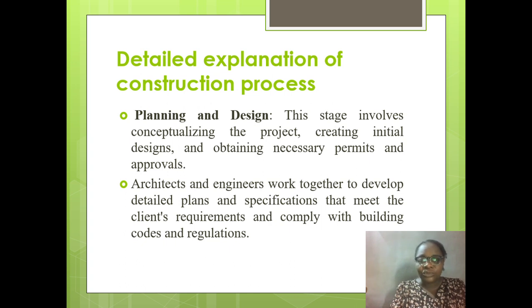So from that, he calls on building professionals that create initial designs, including architects and engineers. There we also have the quantity surveyor to bring up the detailed costs of the initial design, to determine the cost of the building compared to the capacity of the client.